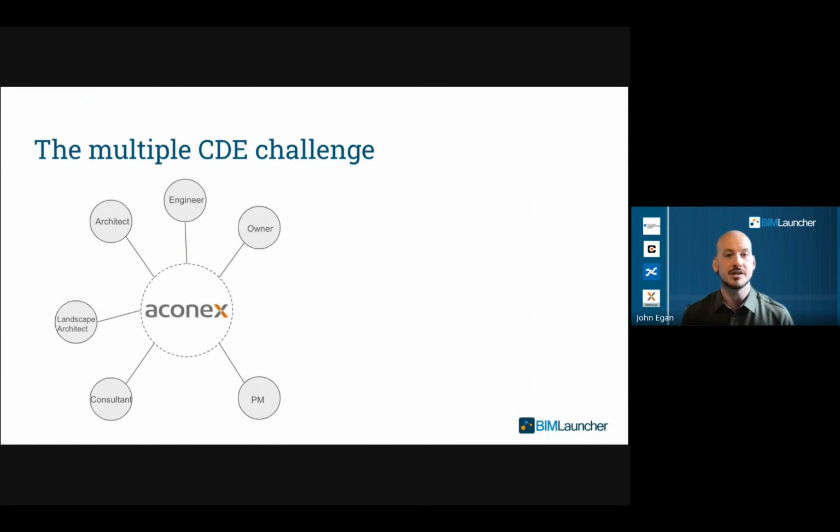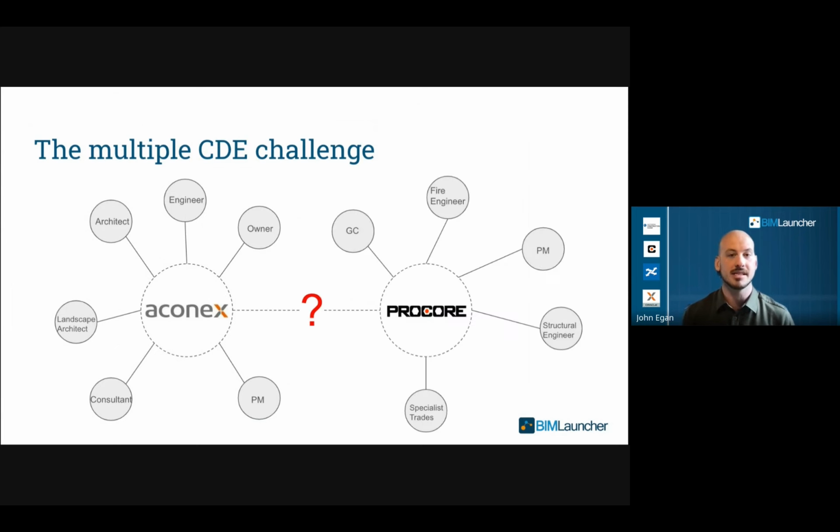So following your decision to use Procore, the single CDE system on your project will no longer be the case. Instead, it has shifted to a distributed common data environment with both Procore and Aconex. And you have acquired an integration problem that you now need to solve. Per the BIM execution plan, you know that the contractual documents and correspondence will be managed in owner's Aconex, and you have a responsibility to ensure that your teams have everything that they need in Procore, including up-to-date approved drawings.